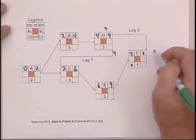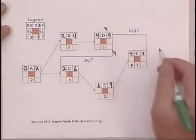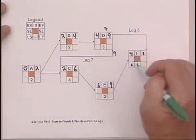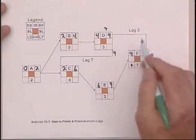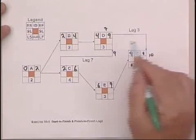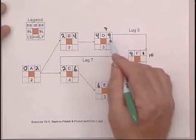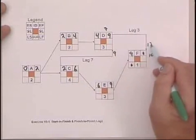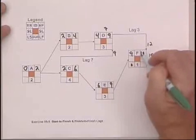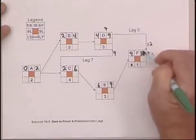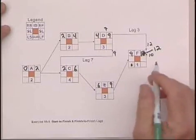And here there's just a little bit of a typo. We're going to leave that blank for now because we haven't calculated that. But now we want to find the early finish for activity F. Nine plus one is ten. But F can't finish until three days after the completion of D.